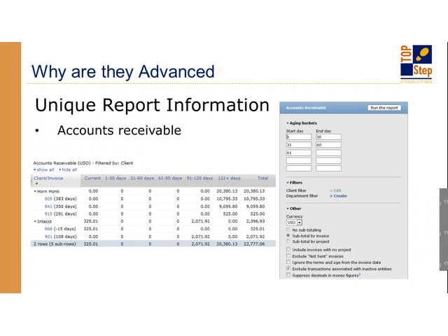What I have here, I'm subtotaling this one by invoice so I can see by client all of the invoices, and I can see where they're current. So I have an invoice that was maybe just submitted or dated in the current period. And then I have these aging buckets where I can see where the dollar values are falling. So in this particular case, for my Intex client here, they have one invoice that's current, but they have an invoice that's 108 days outstanding. I see I have some invoices here from my Horn Honk client that's over 121 days late.